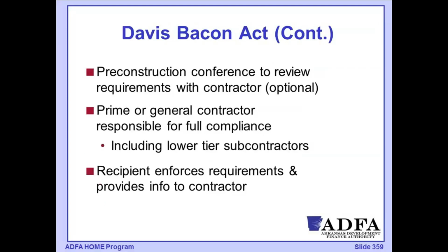As part of Davis-Bacon Act compliance, we would need to include in the pre-construction conference a review with the contractor and the subcontractors about the requirements of Davis-Bacon. So when we have Davis-Bacon requirements, the prime or general contractor is going to be submitting certified payrolls on a weekly basis for review to make sure that they are in compliance with the wage rates.